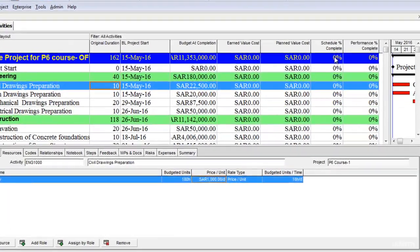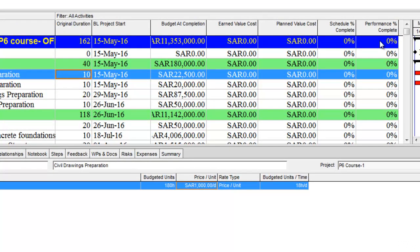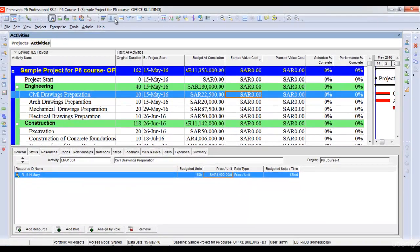The schedule percentage complete is zero percent and the performance percentage complete is zero percent. I have pulled out these columns from the columns customize menu — earned value cost, planned value cost, and budgeted completion from the earned value tab. I have also pulled out baseline project start, because before starting earned value calculations we must have assigned a baseline. The schedule percentage complete is calculated from the baseline, while the performance percentage complete is calculated from the update percentage of an activity — for example if an activity is 20% complete, its performance percentage complete will be 20%.